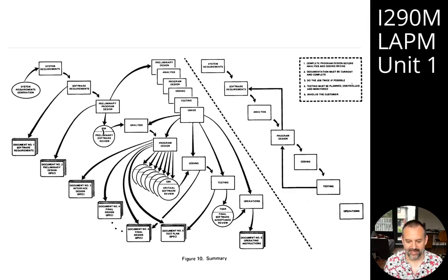And the reason he says that is because you're going to learn a bunch of stuff doing it, and your first effort probably won't be that great, but your second effort, you'll be able to benefit from what you learned the first time doing it. And so what this is basically saying is the first time round is a prototype. And in the prototyping phase, you're going to learn a bunch of stuff that will let you do it properly for real. So doing it is a form of risk mitigation, learning by doing.